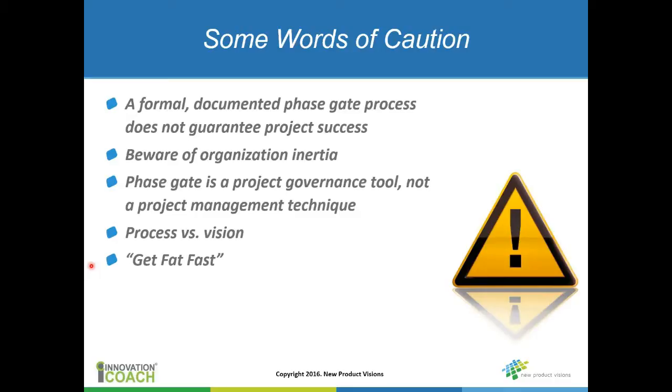The higher the uncertainty in the project, you might want to invest more heavily at the beginning of the process versus at the back end. Typically at the back end, what happens is the project is late. Senior management typically wants to put a lot of resources in the project really at a time when it is not going to help get the product to market any faster. Actually, it can hurt more than it can help.